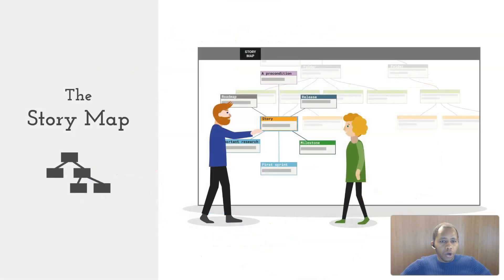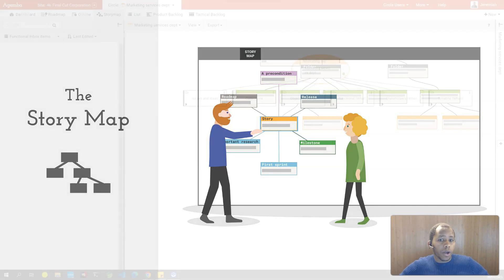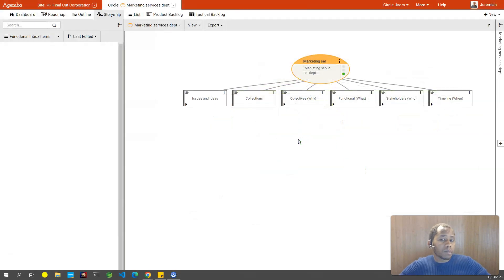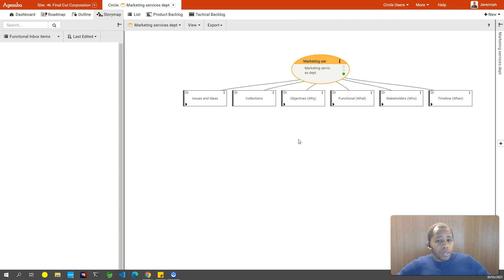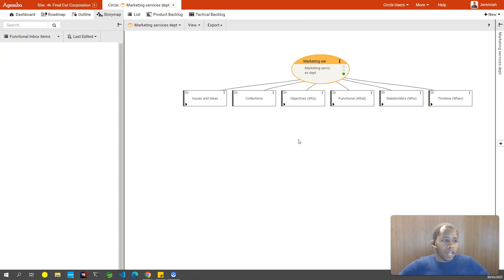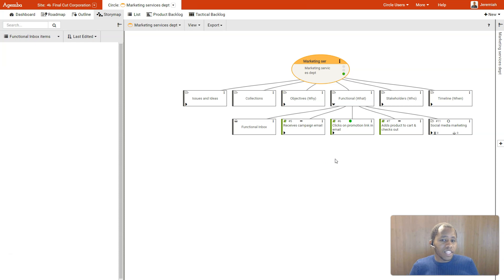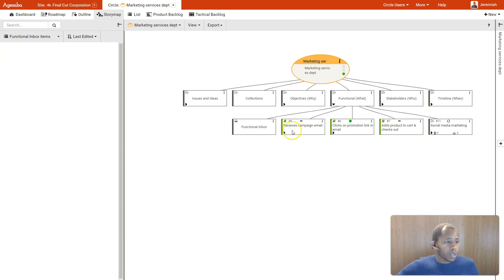The story map. A creative way to start is to begin with the story map, mapping out your ideas like a mind map. You can build it up like a map of the user journey, mapping out the experience you expect the user or customer of your product to have from left to right, and then fleshing out what needs to be done to achieve that in story form below.